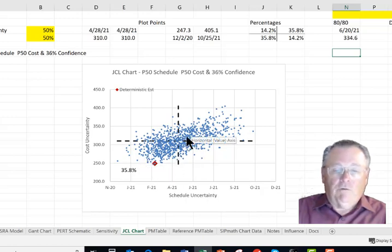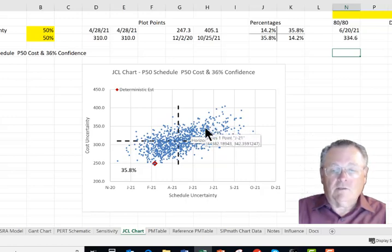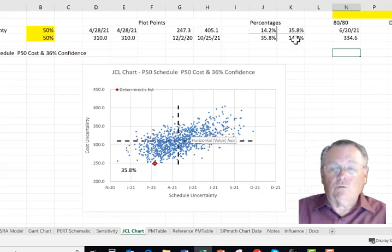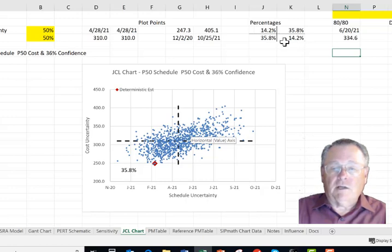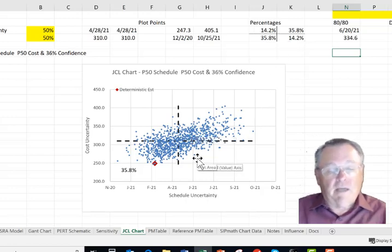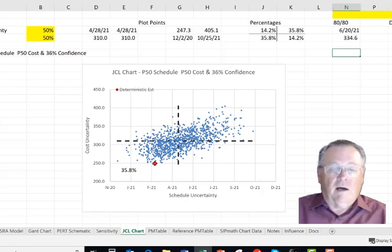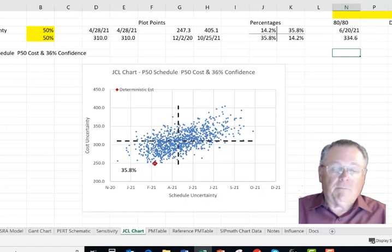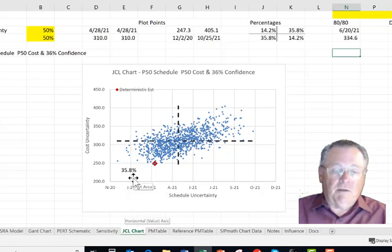Over here, we're above over cost and behind schedule, taking longer. That's 35.82% as well. And then 14.2% on either side. So the government would call this, if you put in for 50% on both, only having a 35.8% chance, confidence that you're going to meet both schedule and cost.